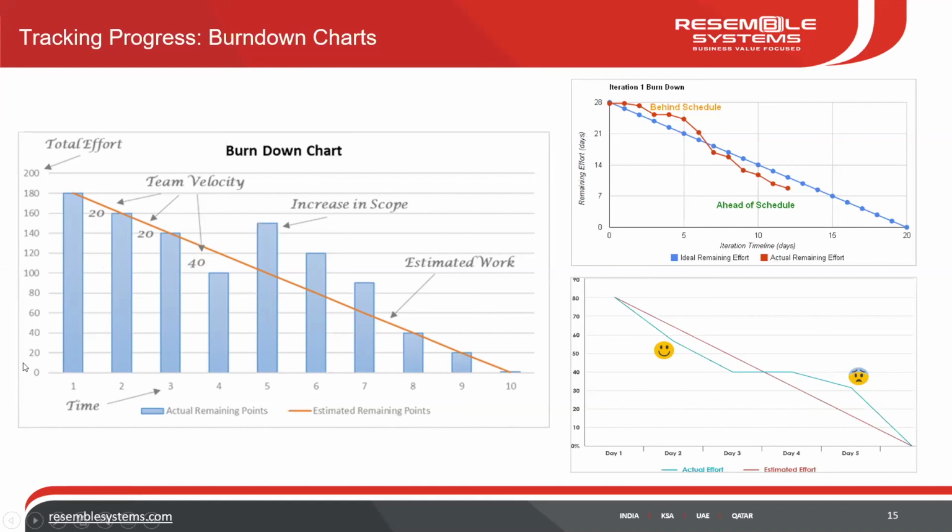So if you see on the left, each user story is given a point, right? So these points are added here. Say, for example, there are 200 points, and on the left axis is where you see the number of points. On the right axis are the number of days. For example, in a 2 week sprint, imagine 1 week has 5 working days. So two sprints will have 10 days. So the team has to complete these tasks in those 10 days.